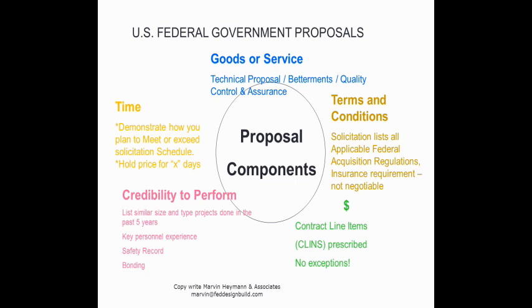If you decide that I am not going to take on the liability issues that the government wants me to take on, and you exclude that from your proposal, the government will believe that you're non-responsive, and they will set your proposal aside. Even if they love your solution, they will set your proposal aside. They probably won't even look at your solution.